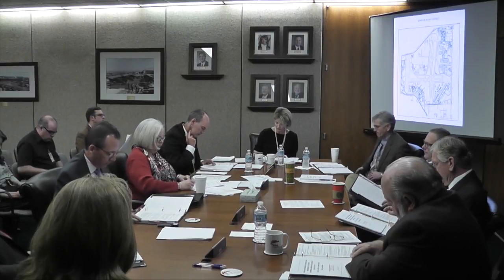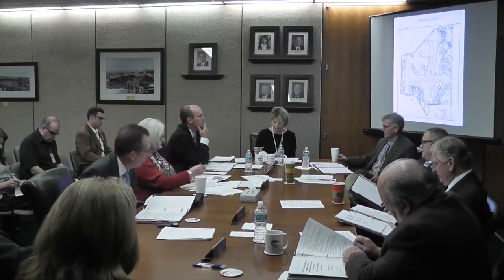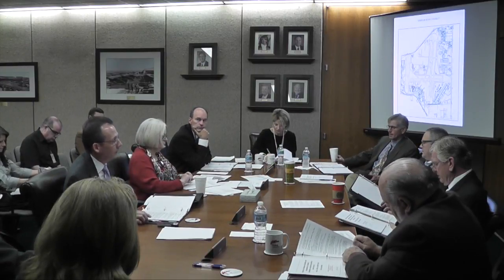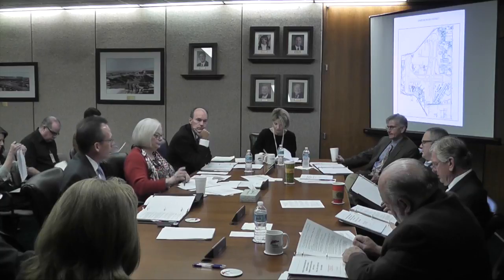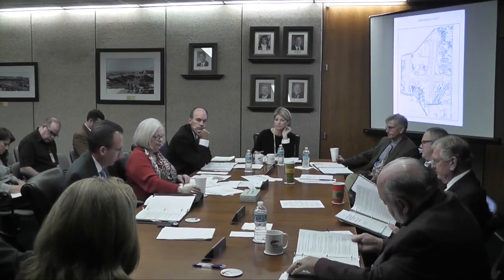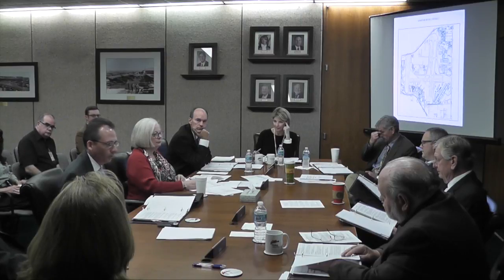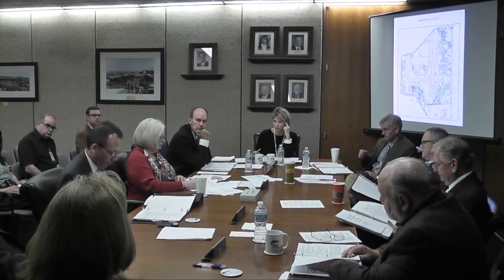And if we can, we might take 3B2 and 3 really together. This actually started as one project that we bid and rejected, the one bid that we received here a couple of months ago. In an attempt to try and get better prices, we split it into two. I'll go through it here in just a minute, but we were not successful. We still wind up with just one bid, and the prices, for all practical purposes, are the same as what we got before. In fact, in some cases, maybe even just a smidge higher.